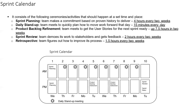Once the sprint review meeting is done, we can continue with the retrospective — taking a break if needed before continuing. The retrospective is a meeting to gather information on further improvement. The team will figure out how they can improve. Each member of the team would participate and talk about three points: what went well, what we did not do well, and areas of improvement. Based on that, we create retrospective items — further improvement items that the team agrees, if implemented, will help going forward.